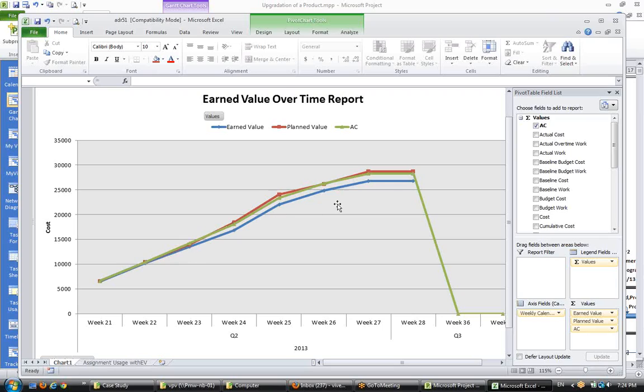Right? This is the earned value report. That means we will go over budget, is it? We are not over budget, but we are underachievers. But our cost is touching baseline, no? Our cost is touching baseline, but we have underachieved. So to achieve our maximum limit, we will cross budget, no? Right, we will be over budget. Absolutely right. So can we see budget at completion here as well? We can see the budget at completion, but not in this. We cannot see it in this.